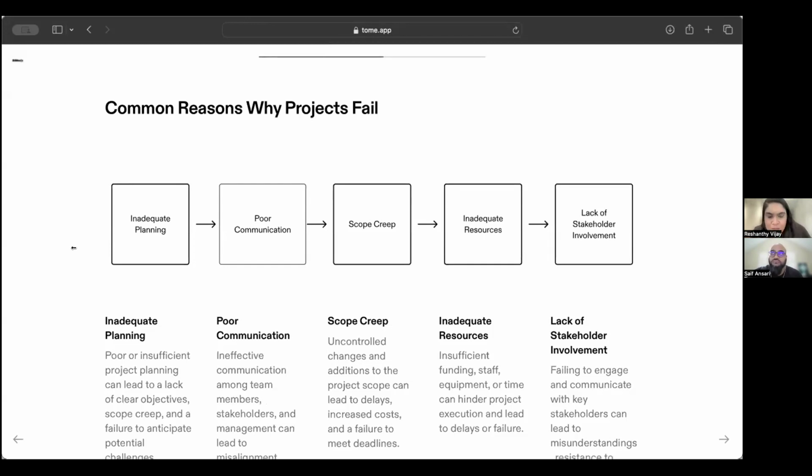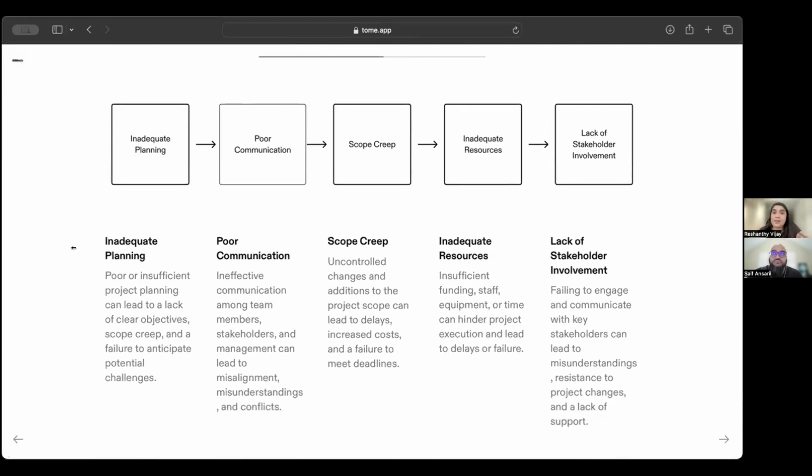They make false promises. They're like, hey, we could deliver an app in 8 weeks. I'm sure Michael knows the story. We've worked on that project. There's no way you could deliver a full-fledged app in 8 weeks based on the requirements that the client is giving us, right? Because we're at an early stage, the client has a vision, they want everything and anything, and we're making false promises. At the same time, it's lack of planning.